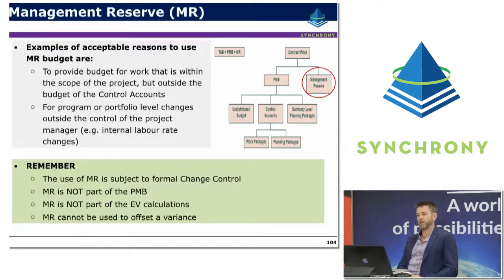Okay, so management reserve. There's a number of different reasonable or typical uses for management reserve. To provide budget for work that is within the scope of the project, but outside of the budget for control accounts, for example, or for program or portfolio level changes that are outside of the control of the project manager that are going to have an impact on the project. Some examples of this might be a sudden change in the internal labour rate within the organisation, or an ERP implementation or another internal project within the company that affects the project but couldn't have been anticipated